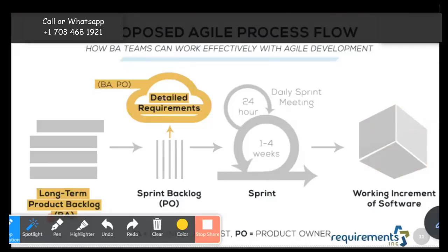And each one is laid out in its priority order. The most important thing is on the top. Also, the most foundational piece that needs to be done before you get anywhere again resides on the top. For example, if you take a system, you might first want to build who the different user types are and what the different entitlements and abilities they will have once they log in, that sort of thing, right? So your first items are going to be foundational pieces, and then the most important pieces